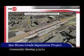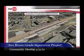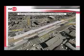If that happens, we'll keep running trains for a few more months out of the temp station, and then we'll allow them to finish their tracks. The other possibility is that those two months turn into six months, turn into eight months. At that point, we'd finish our station, and you'll have a temporary period of time where you have essentially a very large boarding platform. It's not ideal, it's not our plan A, but if that does happen, that's what we'll do. We'll finish out the platform, if you will. That'll be a temporary structure. It'll allow people to board at the brand new station, and then we'll wait on high speed.